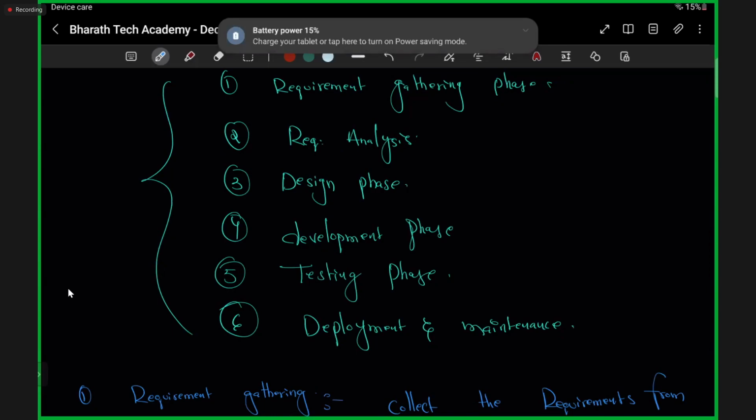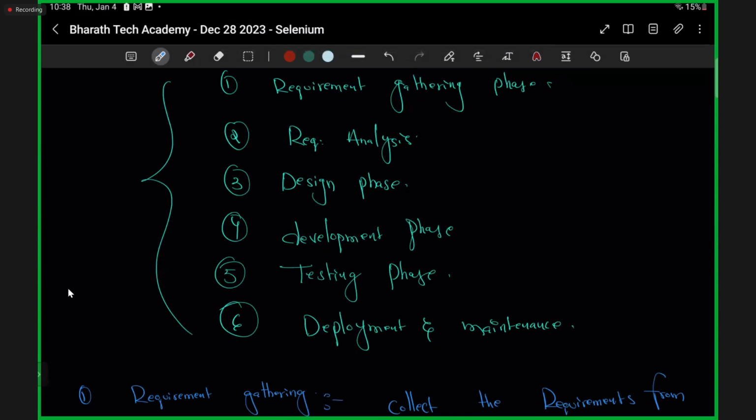From the business analyst, we take confirmation whether they have collected all the requirements to start our project. The project manager also provides it: I'm good, I know the budget side and the resources side, and I'm good to complete within this. Like this, each and every person at this stage provides approval. Then only we start the actual project. Otherwise, the project will remain in discussions only.